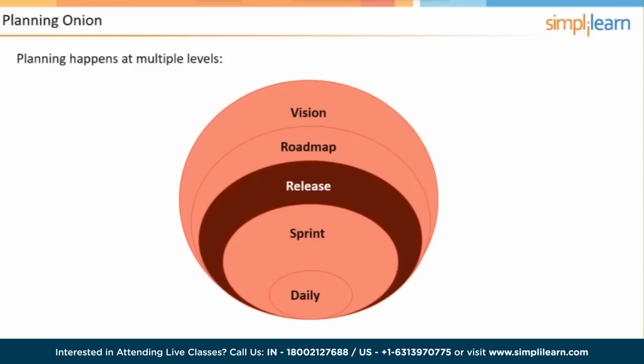My example of that website that I'm working on has 3 versions which make up the product roadmap. Version 1 is the free site, version 2 is the membership site, and version 3 is the pay referral commissions version of the site. And the product roadmap is then supported by releases. So for my project, I have 3 releases. All of the user stories needed for the free version are in release 1. All of the additional user stories that are needed for the paid version, the subscriber version, and then also for version 3, those are all releases, 3 releases.